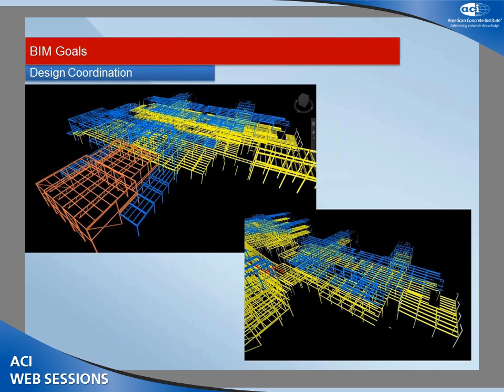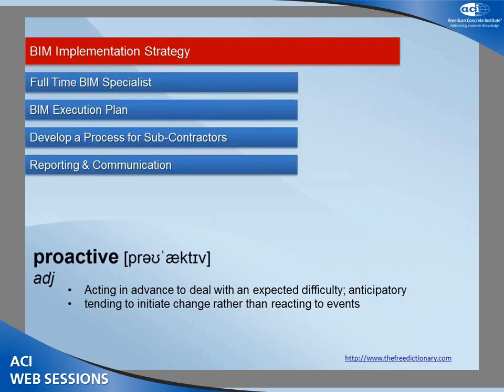There's the Trustman structural steel model — you can see it's color-coded and broken up by installation phase, so you can visually see how it's going to be installed. You can also link this to a schedule and play a 4D animation. We had the original structural steel model from Stevenson, then pulled that out and brought in the Trustman Tekla model and overlaid that in Navisworks.